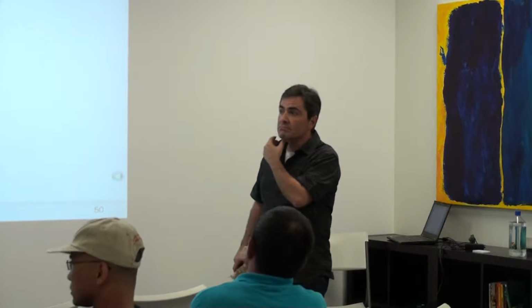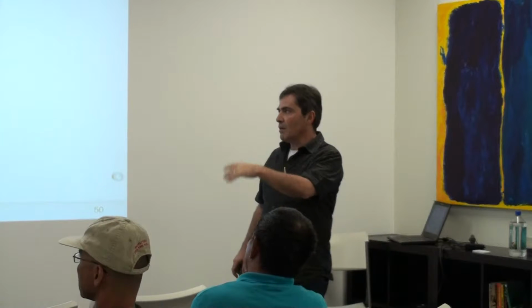So you just kind of said, we force them to sync up. But what if one team is late? You can't always do it, right? Well, actually, let's say you have 10 things you're going to do in that sprint, and your time box comes to an end. You only have 8. Those 8 things are what you're going to demo. Those 2 things you didn't do will get pushed back on the backlog. So we always honor the time box. So you really are done, it's just the scope that changes.